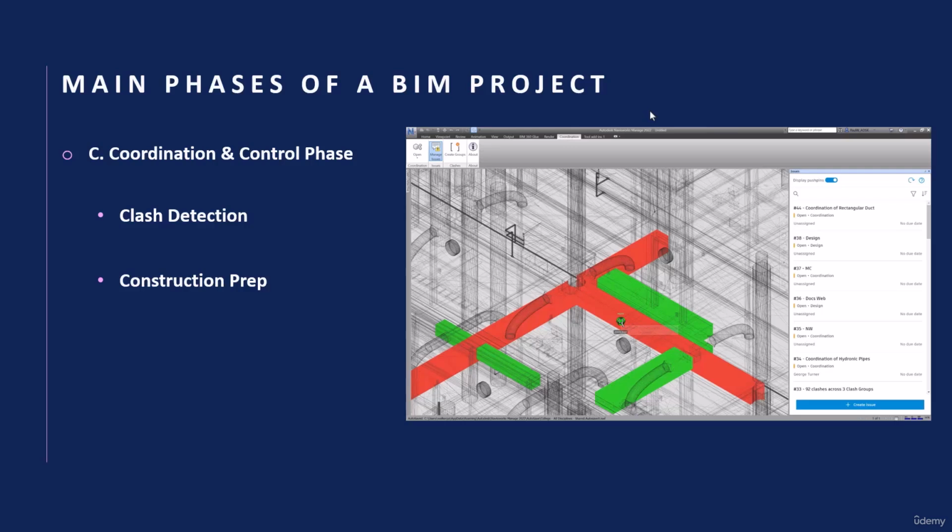How does this actually work? You come to the building timeline program that the control group provides you in the form of an MSP file or Microsoft Project. You connect these to the objects that you have modeled in your environment. This is done in Navisworks, and this causes you to produce an animation that comes in accordance with the timeline program, with your objects modeled from the bottom to top.